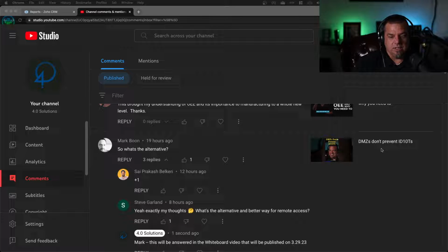So velocity is of the total amount of hours that you have available to you, say 8 hours of development time in a day. If I'm operating at 50% velocity, that means that I'm doing real work, like actual work, for 4 hours.